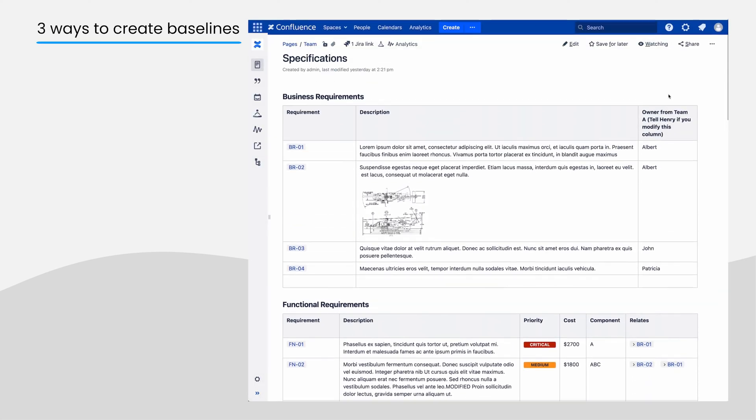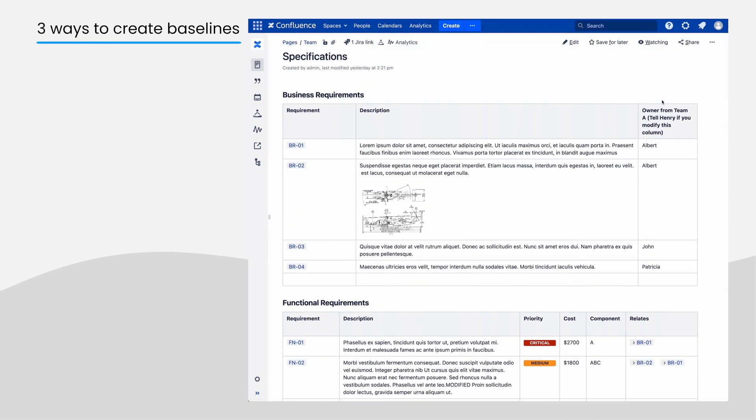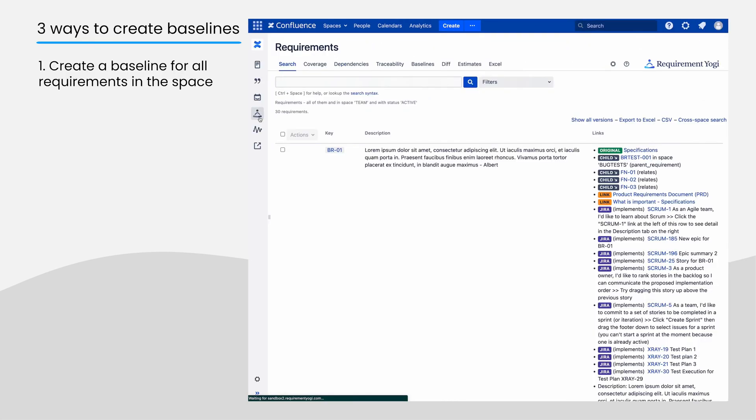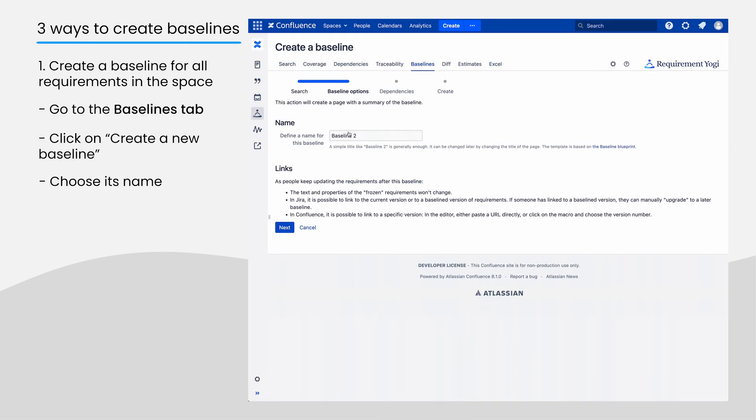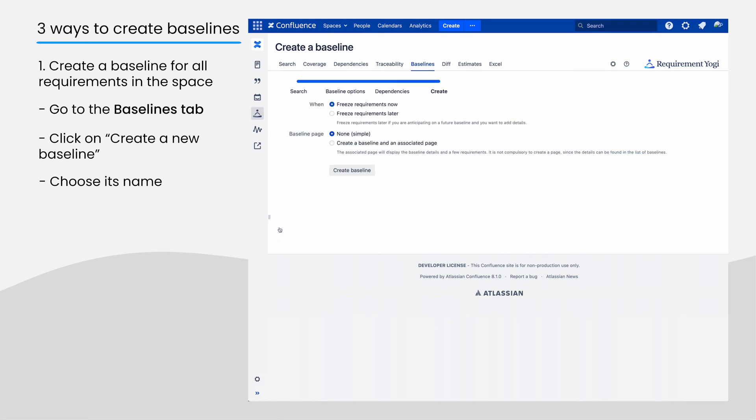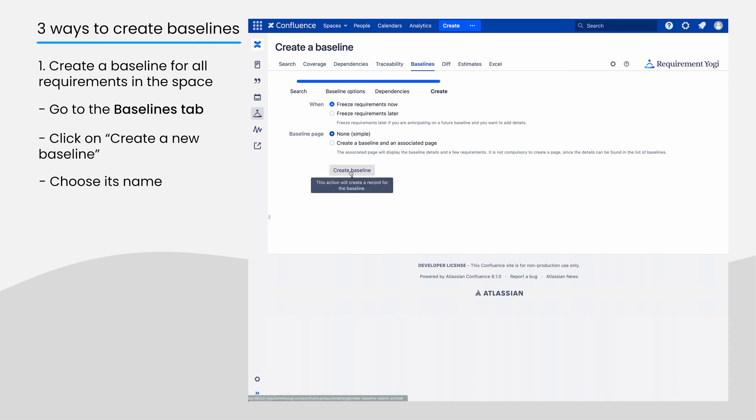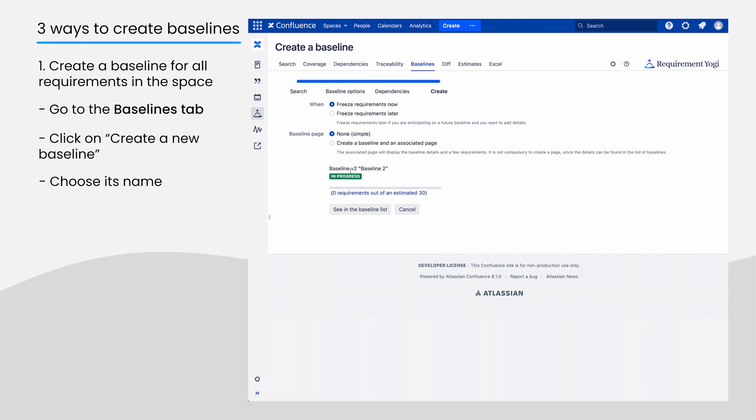There are three ways to create a baseline. To create a baseline for all requirements in a space, go to the Baselines tab, create a new baseline, and choose its name. You have the option to freeze the requirements now, or later if you're anticipating a future baseline, and choose if you want to create a specific page for the baseline. And just like that, you're done.